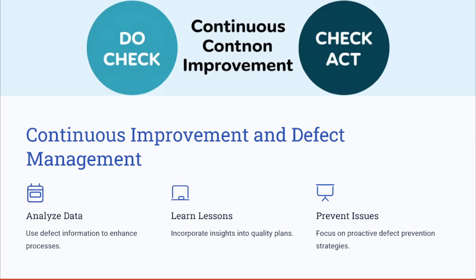You might use the defect data to enhance the processes and incorporate lessons learned into the quality plan. So using defect data can help you in the future. Also, it can help other project managers learn from the defect frequency, the defect resolution, and the defect urgency and impact on the overall project.